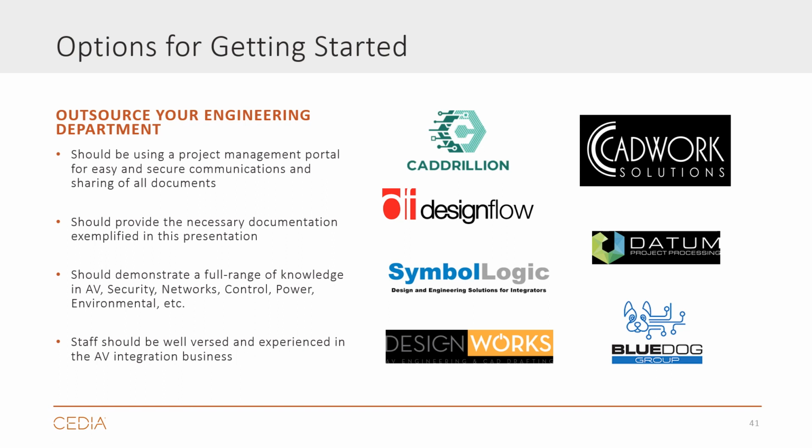By outsourcing your documentation, you get another set of unbiased eyes at your work, and this is a good thing. As an example, if you provide the team with a proposal and ask them to show it on a building plan, they may be able to identify gaps, overlaps, or other problems in your proposal before you present that to the prospective client.